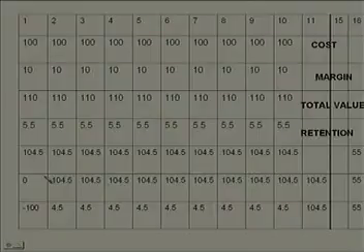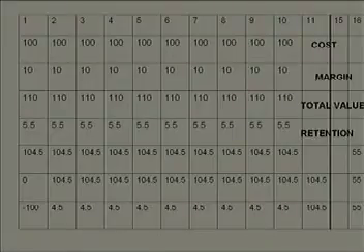Come to month 2, you are getting a payment of 104.5. As against that, you have spent rupees 100. So, what is your net cash flow? It is 4.5 on the plus side. That means your cash surplus as far as month 2 is concerned, because you are getting 104.5 from your owner and you are incurring only rupees 100.